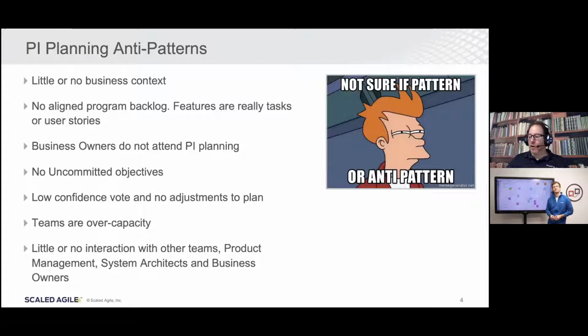I think those are excellent points. And adding to that, what we have found is that when you are doing remote PI planning, you need more time. Typically, PI planning is done in 2 days. But when you have the entire ART all remote, then you need more time for PI planning. It doesn't necessarily mean that the agenda is longer, but people staring at the screen for a very long day is going to be hard. So if you can do some shorter days, but do it over more days, that's usually very helpful.